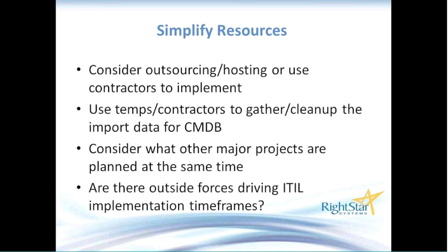In other words, is there something regulatory that may be an audit or something that forces you to get change management or release management done before the end of the quarter? Or maybe is there a budget restraint that says you have to get this done now or you can't do this until later? So those are things that have an impact upon resources. So if you're trying to simplify the resources aspect, you need to look at these items.